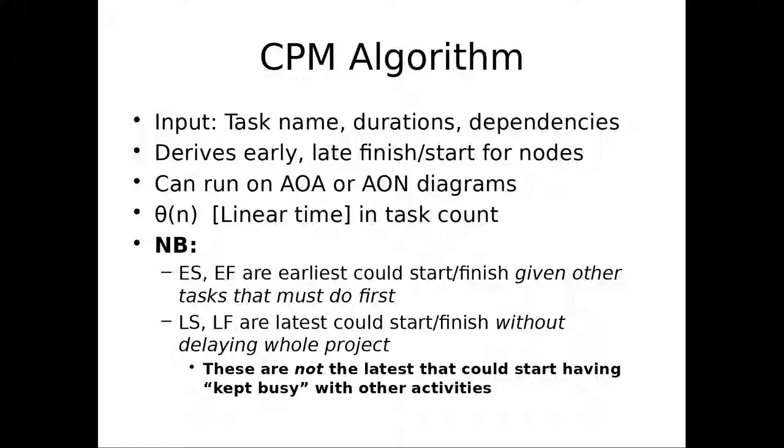They have no give. What does that mean intuitively? Anyone? You have to work on them as soon as you can. Because if you delay work on them, guess what's going to happen? The project will be delayed. The project will be delayed as a whole. So these are things you can't let up on. You just got to stay on top of it. Because if early start is equal to late start, and you don't start it at the earliest you can, which is early start, you're going to be delaying that task, and you could be delaying it beyond late start, and so it's going to delay, by definition of late start, the whole project.